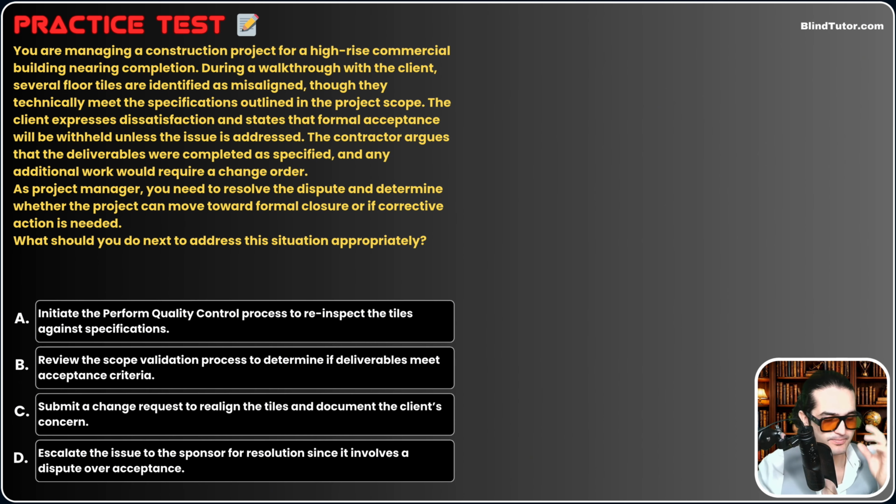This is a conflict. Now, my question to you, where do we keep our stakeholders' expectations and needs and acceptance criteria? Remember, guys, we said acceptance criteria are stakeholders', our clients' needs. These are the conditions that our client wants from our deliverables. We keep them in the scope baseline and a scope statement, and then our team starts working on that list, on that scope statement, okay?